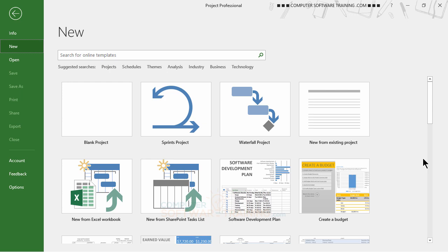Well, you're probably going to be using the same resources, but think about this. If in that first project you grabbed a number of different resources, and then for the second project you're going to do the same thing. Now, if that second or third project is using its own resources, in other words, it has its own resource sheet, the problem is you're not going to know, when you start choosing resources for your second project, whether you've already used those resources in the first project.